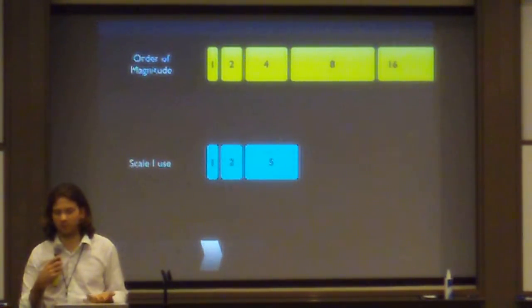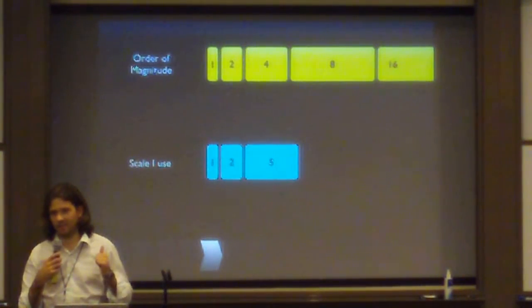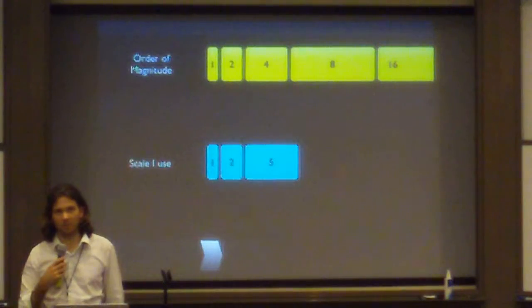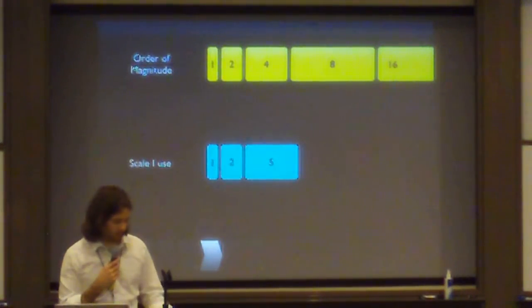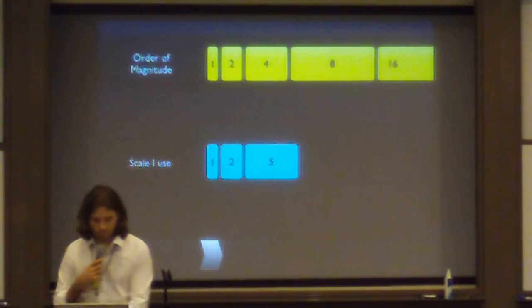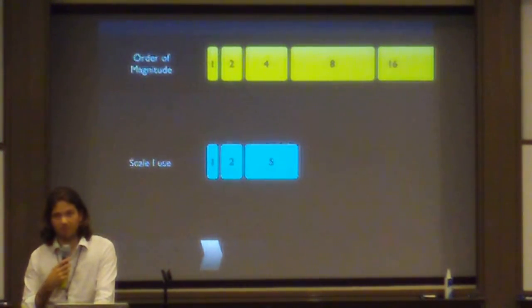You can go with a 1, 2, 4, 8 scale. The important thing is that you use a fixed scale, and that it actually is sort of an order of magnitude scale, and then you also round up. That is one of the tools in your toolbox when you estimate. It's always worse to estimate too low than too high.